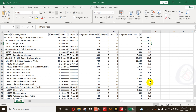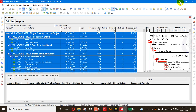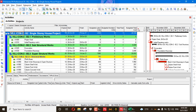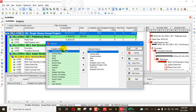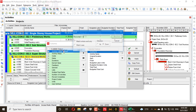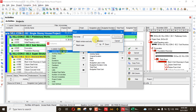We have now created weightages in Excel — the first step is done. Next, we will import those weightages into Primavera P6, then apply them to calculate units at different stages, including increases in cost, labor units, or non-labor units. First, I'll right-click in the columns and add an estimate weightage column.